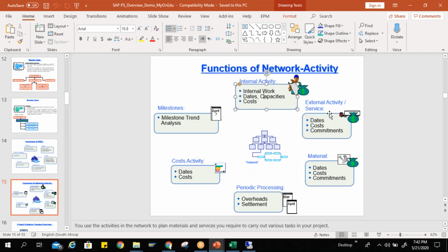Okay, we will see in detail how we can do that. The question is: there is a construction company doing civil activity, and their labor is coming from outside. Earlier, if I'm creating that, it should be considered a service, right? If you are creating it as a service and you want to capture only direct cost, you are not managing their resources, right? In that case, you can go for the service activity.